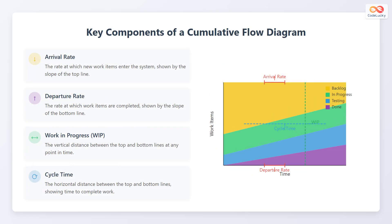Let's discuss the key components of a cumulative flow diagram. First is the arrival rate — the rate at which new work items enter the system, shown by the slope of the top line. Next is the departure rate, the rate at which work items are completed, shown by the slope of the bottom line.